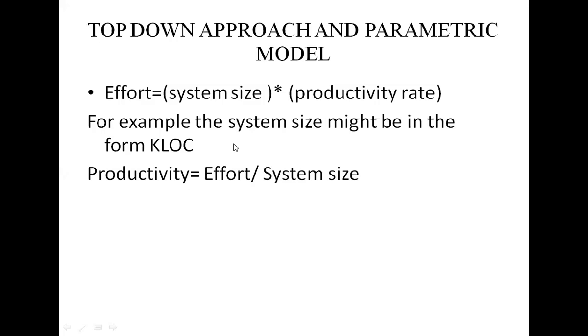So in this case, KLOC is the size driver indicating the amount of work to be done. Here the system size is represented in KLOC. So productivity is given by effort divided by system size. You have to remember: effort is calculated by system size times productivity rate. Okay, clear?